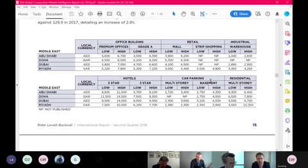But through the process, you will drill down and get more accurate figures relative to the specification and a bill of quantities. Yes, quite, of course, and then the bill of quantities goes out for tender, and that's the point at which you find out what your costs actually are going to be. After negotiation of that tender price, yes. Yes, and you mentioned the JLL high-level costings, and we'll look at that in just a moment. But doing a price per square metre approach is, if I can put it like this, even higher level than what the JLL have done. Would you accept that? I didn't see any reference to where JLL's figures had come from, other than from experience.